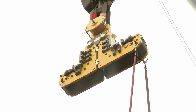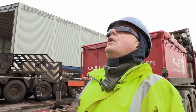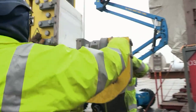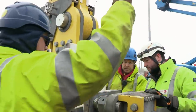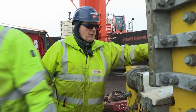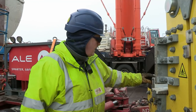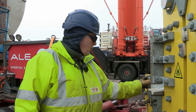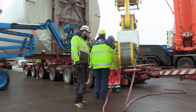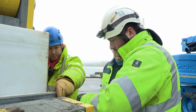We're going to bring it down to the floor and have a look at it, see if there's anything snagging it. It is a little bit annoying, but it's always better to check. If the J-hook fails, none of the giant steel tubes can get on board. I've seen a little bit of damage on the J-hook, on the pad here. It's obviously been caught at some point and it's sheared a nut off there, so it's causing the J-hook, when it sits down, not to sit correctly. If they can't fix it, the lift can't take place, and there's still another 8 sections to load.